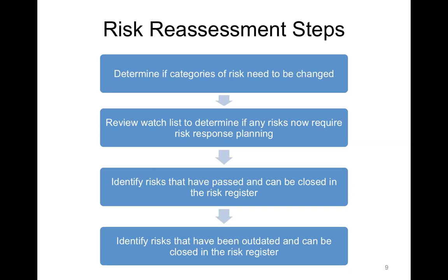Because inevitably, some of the risks will pass and some of them will not pass at all. Some of them will just simply be obsolete. If you have a time-based risk, and with a date, then you can easily determine through monitoring the risk if the risk actually occurred or not, and through the triggers, determine if the risk is going to occur. And if there's no triggers, there's no warning signs, and the date passes and the risk doesn't occur, then you can simply remove that and close it from the risk register.